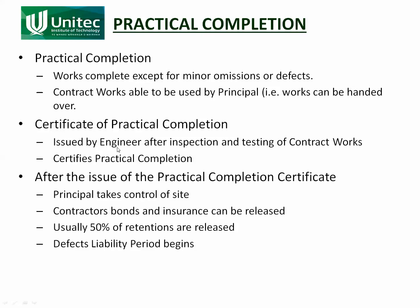The certificate is issued by the engineer, and the decision of whether to issue the practical completion certificate is the engineer's alone. The principal cannot go to the engineer and say he doesn't think the practical completion certificate should be issued, because it's not his decision to make. The decision is made by the engineer and the engineer alone.